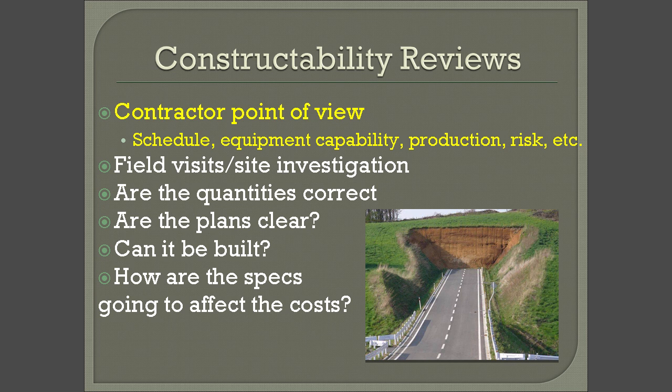It is very important to do your constructability review when you're doing your design. When the contractors look at the project, the first thing they do is look at the plans, read the specs, and set up a field visit. They go to the job site and look at it. Are there five trees to move? They go look and see if there are five trees there.